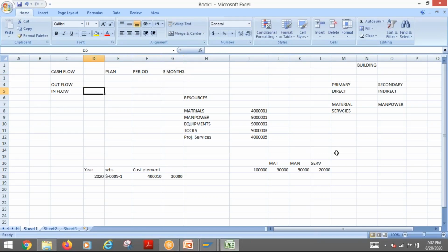So, for example, I will raise a bill in February. Then, when I am going to get the amount from the customer is after 3 months, right? So March, April, May. So it will be end of May only I'm going to get it. So this 3 months before you need a cash, right, to execute that project or that part of the project. So for that, surely finance required some fund need to be arranged.